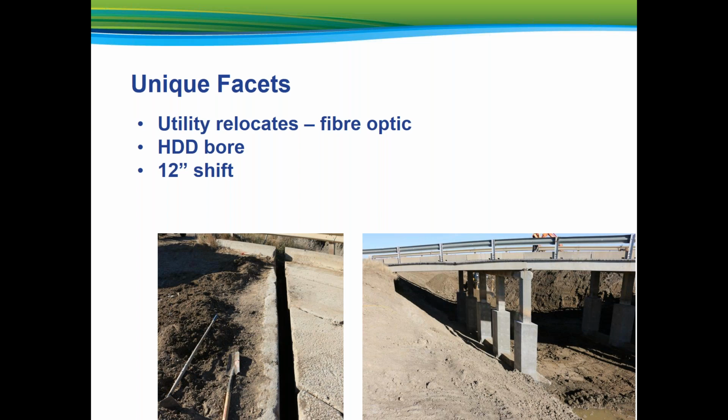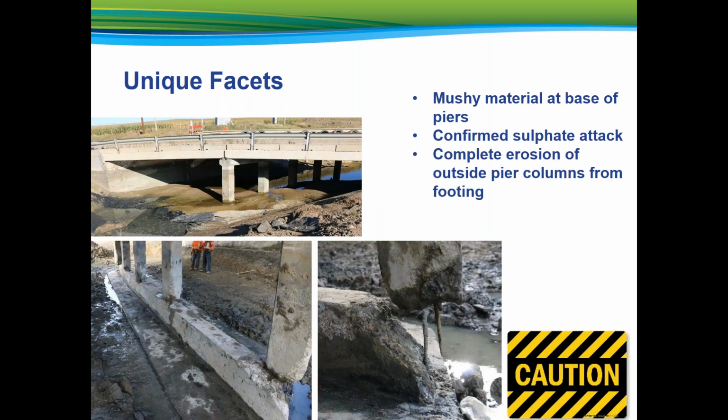In my personal experience on the M1 canal, I find that requesting crossings to be relocated is best done 12 to 14 months in advance of the desired results. This actually includes power, new power services to the control buildings as well. So, some unique stories on the M1 canal.